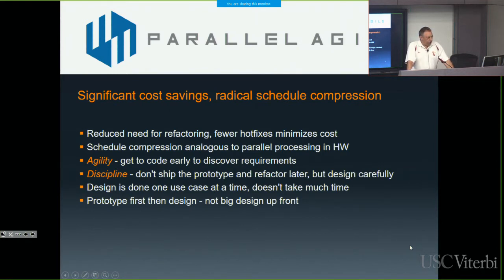And as an example, of the 4 projects that I'm going to show you a little bit later on in this talk, 2 of them have involved about 75 students working across multiple semesters. I don't think any of those projects have exceeded more than, I'll say, 2 to 3 person years of full-time effort. And we've built some pretty significant size systems for those effort numbers.